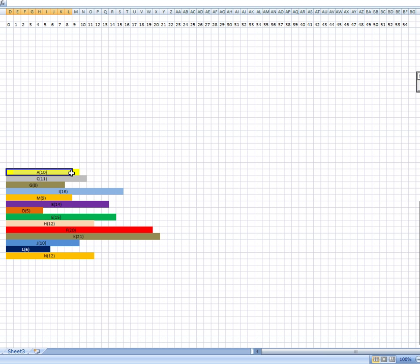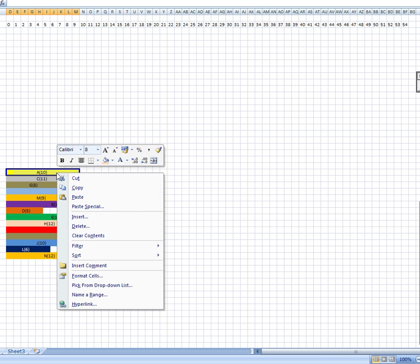I'm going to start by just trying to draw this Gantt chart, and I'm using Excel here. It's not perfect, it should be on graph paper, but the numbers are to the right of the lines they represent. So this line here is 0, this line here is 28. So the numbers are to the right. Now each activity, I've made a colored bar, and the length of the activity represents the number of days that the activity takes.